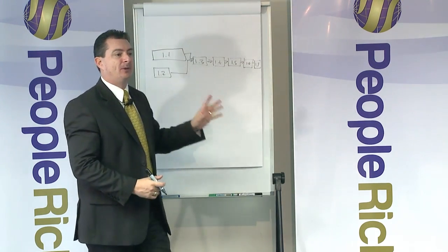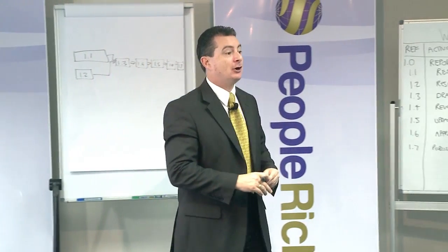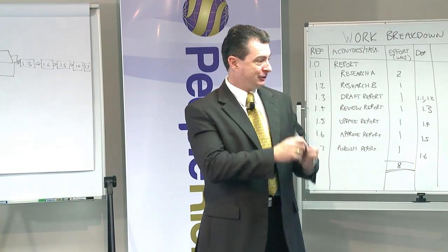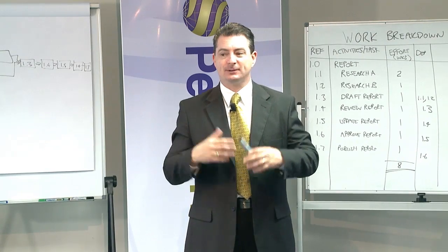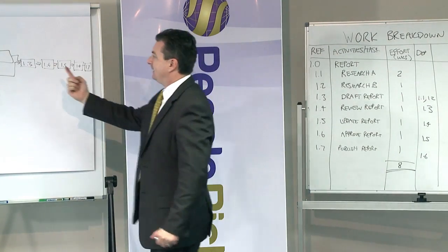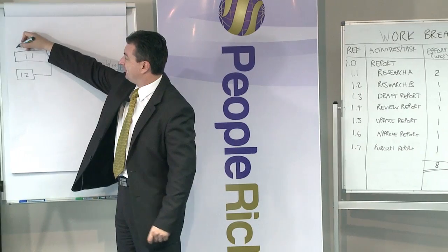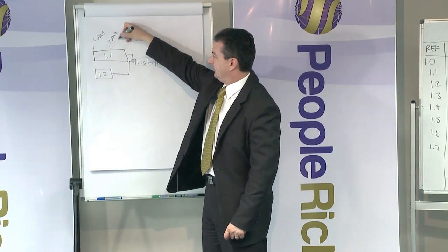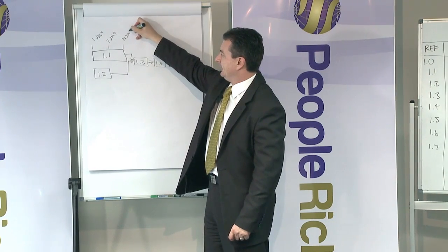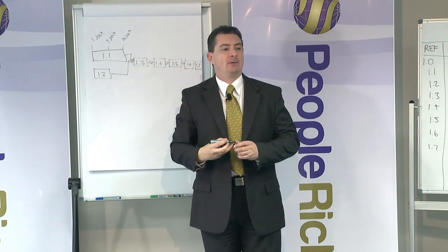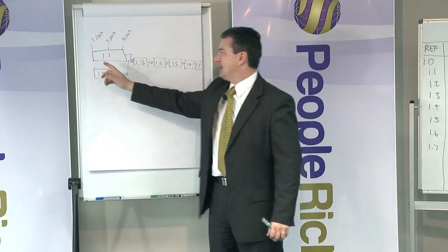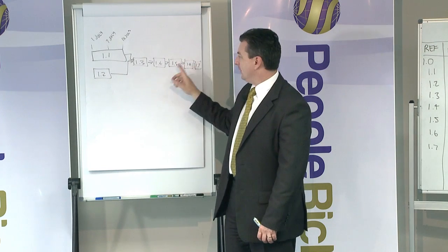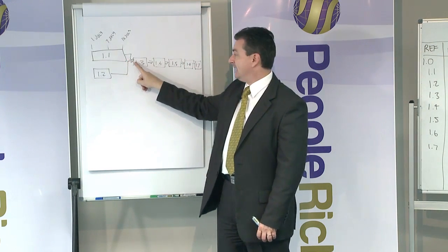What am I drawing up, by the way? There's a name for that, for the people that may know. Gantt chart. And in there we can determine what's known as a critical path. So what's a critical path? Well, see this one here. If I said that this starts on the 1st of July, and therefore there's the 7th of July in the middle, and that's the 14th of July. If I wanted to make sure it went for the minimum amount of time, and I started on the 1st of July, these would have to go one after the other. Would you agree?